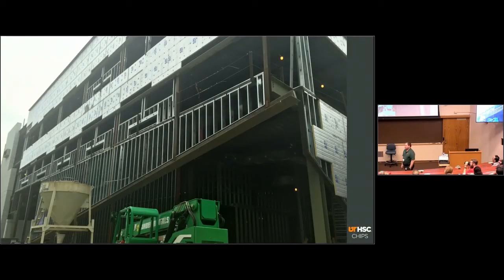Construction was started, going through construction, and dealing with some of the issues that were encountered. One of the issues, and I don't even know what it was, when they tore down that building, there was something with the, do you know what it was, Nick? Like, there was something wrong with the water or something. There was something wrong with the drainage or something in the land itself that actually delayed the project for some months. So we went through construction.